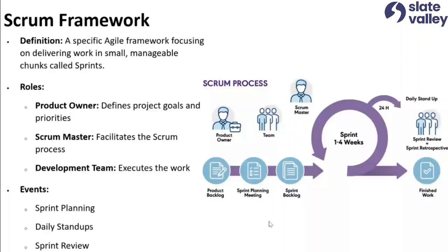What happens in daily stand-ups? The reason this is called a daily stand-up is because these calls are very short. The only thing discussed in the daily stand-up is what I did yesterday, what I'm going to do today, and whether I have an issue or not. That's it. People are not even allowed to sit for that meeting. It is very short, 5 minutes at the max if it's a small team. If it's a larger team, it's 10 or 12 or 15 minutes, not more than that.